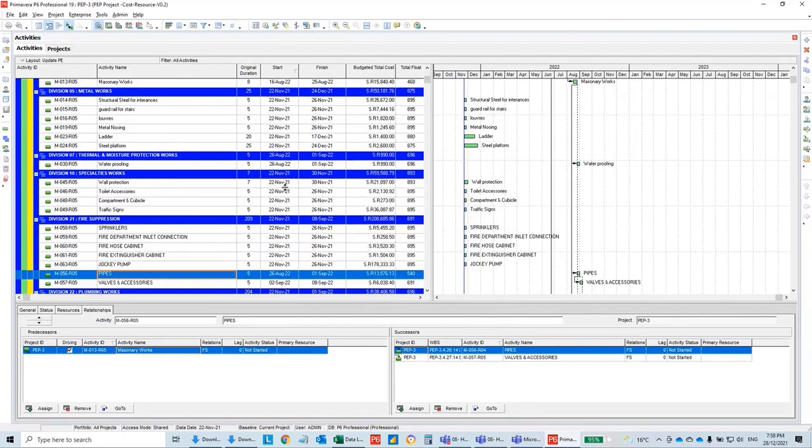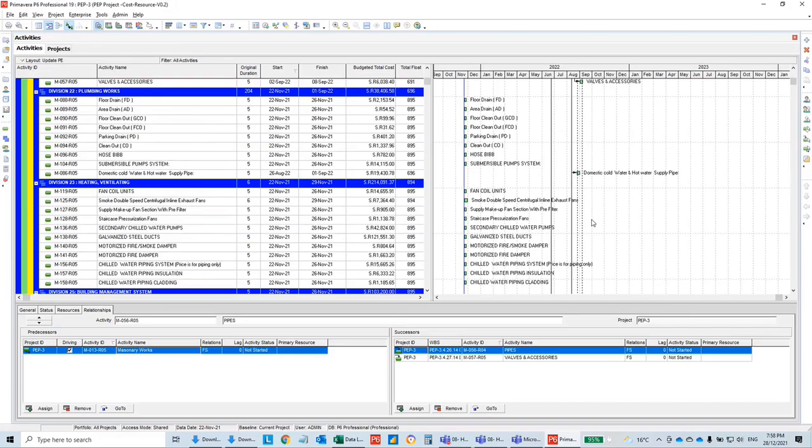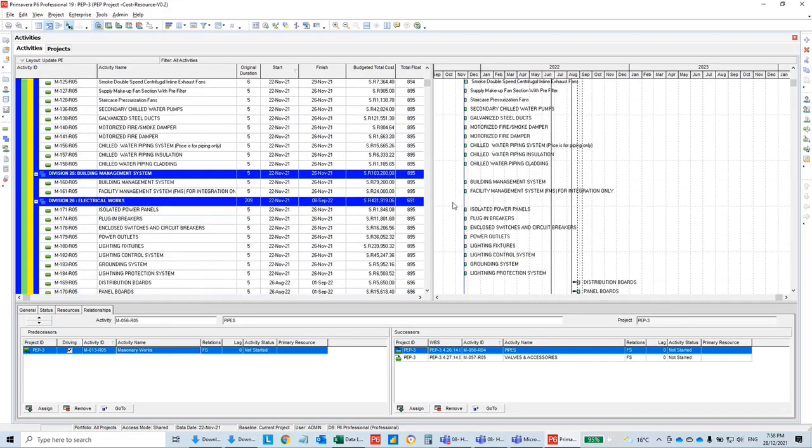And then I can use Excel. Think, what is the bulk? Relationships, do it in Excel. Some smart relationships need to be done in Primavera. Some specific relationships need to be done in Primavera. I recommend, if you want to link floors together, first floor or second floor or third floor, do it in Primavera. It is easier to do it there. If you would like to do relationships between or inside each floor, do it in Excel.